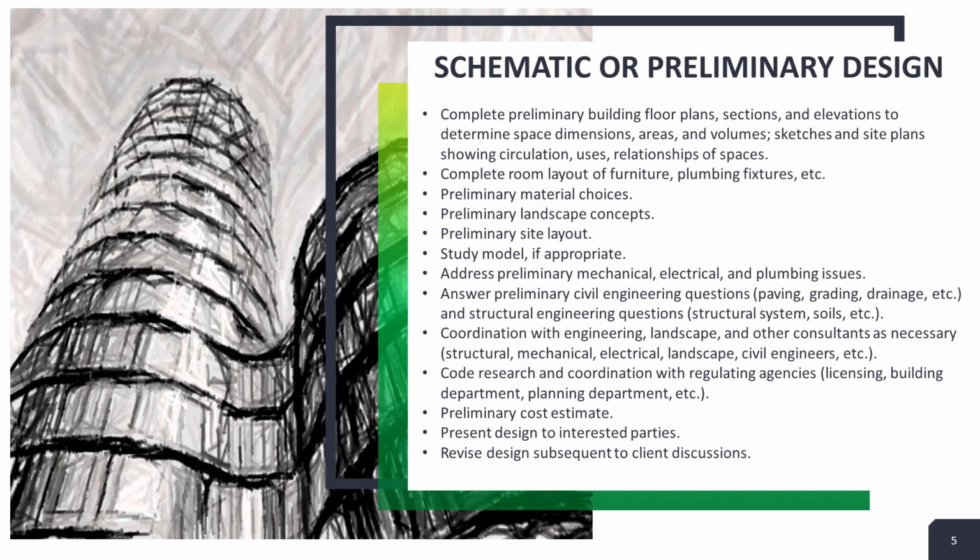The schematic design will address all significant areas of design and will be reviewed with the client before proceeding with more detailed drawings. A preliminary cost estimate is also usually provided at this stage. It's really important that after we complete each one of these phases that we get the owner to sign off and approve it, because our original fee for the project is based on a certain amount.